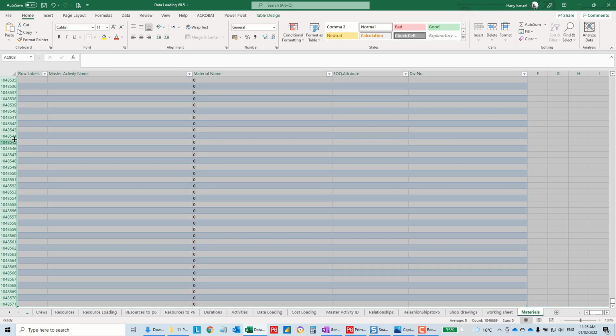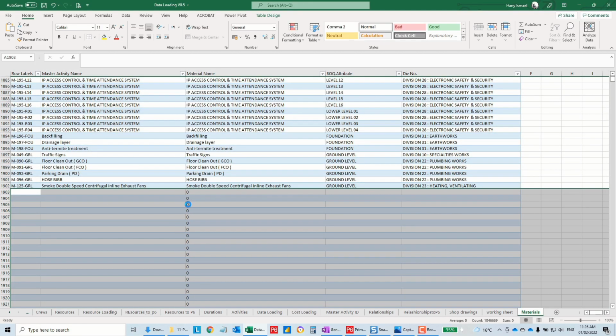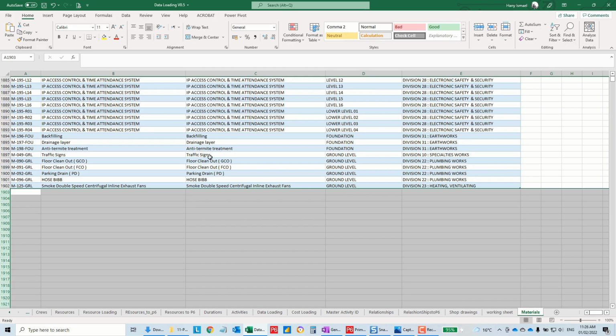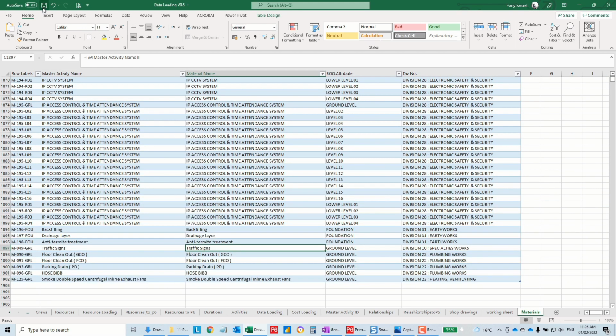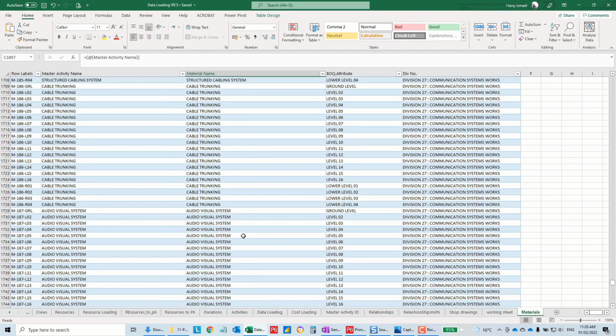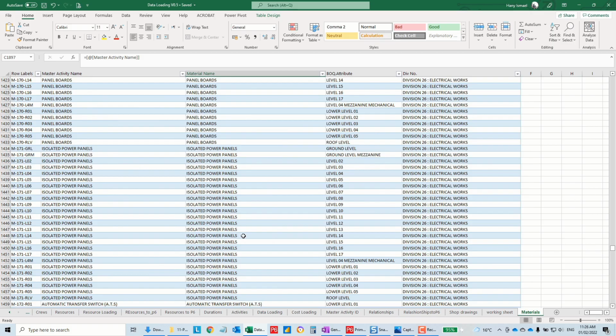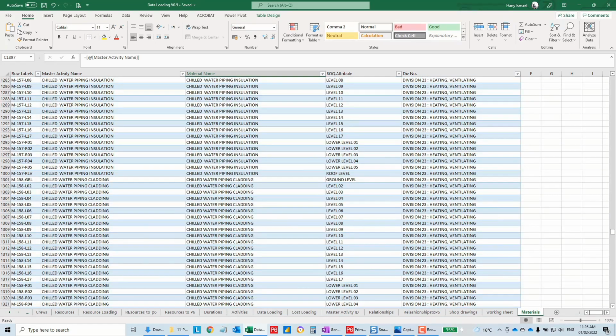It was intentionally done to give us the feeling of what you will face if you make too many activities. Okay, so here we will have material submittal, then material approval, material procurement, and delivery to the site. This is very good.